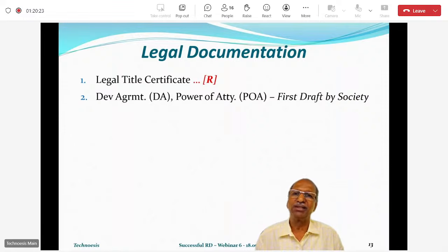Because my experience is that we prepare a tender document, and then the developer's lawyer sends us a draft. It has happened two or three times, and we rejected the draft because it came from the developer's lawyer, who had no bearing on the tender document. He had taken the draft from his earlier drafts, copy-pasted, modified it and sent it to us.